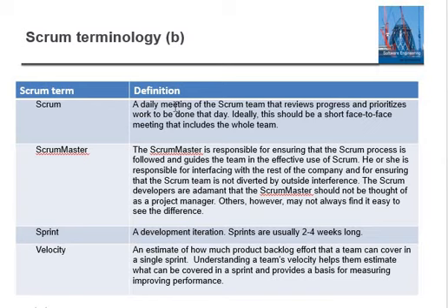It's a collection of tasks with the stories, and the velocity and estimate of how much product backlog effort the team can deliver in a single sprint. So in a whole Scrum project, there are different sprints of different lengths: 2 weeks, 3 weeks, or 4 weeks. In each sprint, there are the tasks, there are the stories.